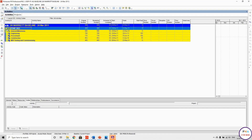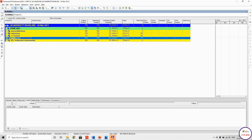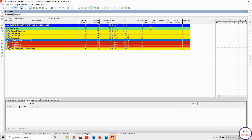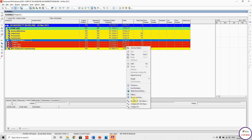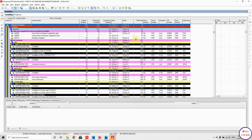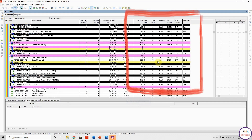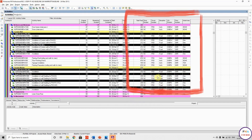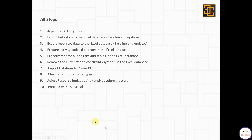The key recommendation is to make all codes filled in for all activities — don't leave anything blank, especially in the construction activities. As you can see, I don't have any blanks; all codes have values for all construction activities. This is important because later I don't want to have blanks in the visuals and slicers.